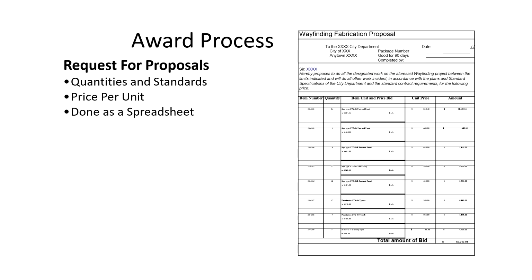Vendors typically provide a breakdown of the cost of material, fabrication and installation, and any other added services if required. This overall process is usually done in spreadsheets, which facilitate comparison and analysis of the bids from different vendors, and pricing information is often requested to be submitted in the form of a spreadsheet. This allows the organization to easily review and evaluate the proposed cost of each unit of signage, as well as any additional fees, discounts or offers by the vendor.